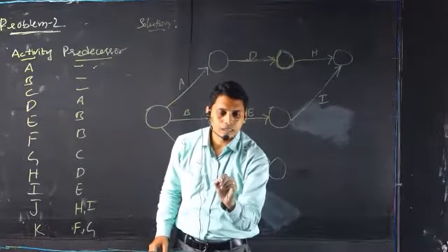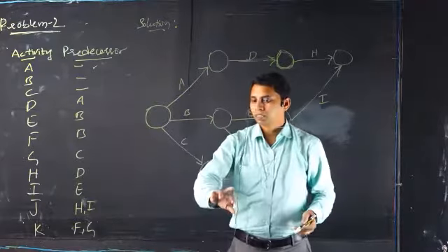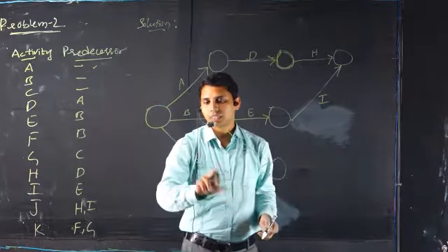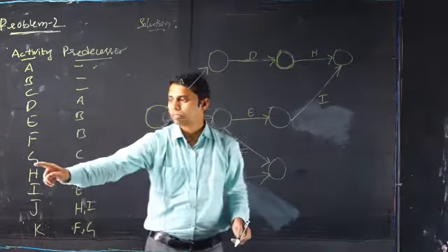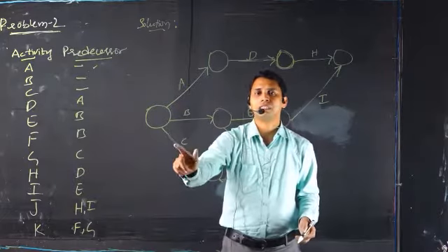We will join this G with the F. Now, while writing here, is there any deviation for writing G, is C the predecessor or not? Yes, for G, C is the predecessor. So we have seen that for G, C is the predecessor.